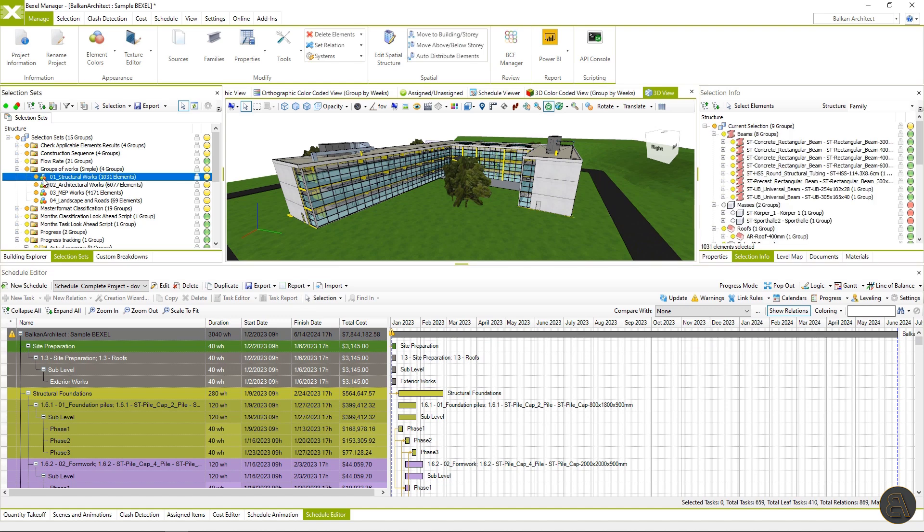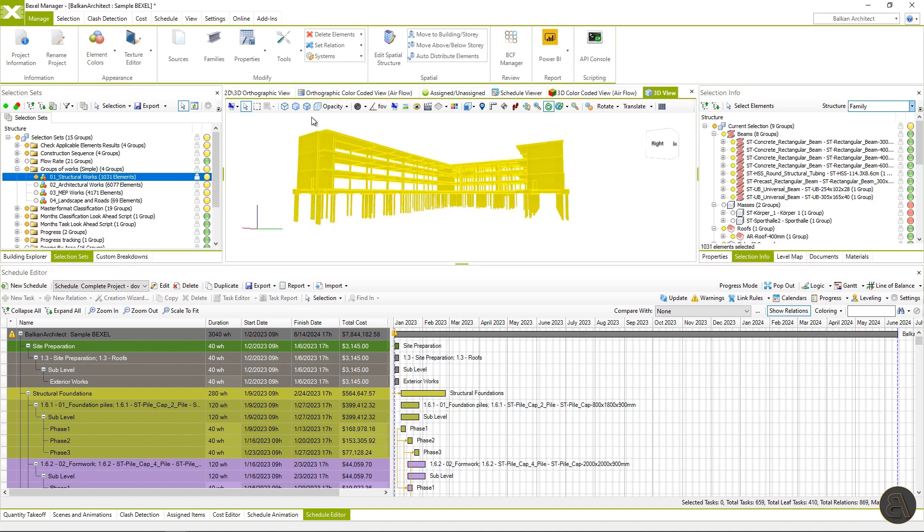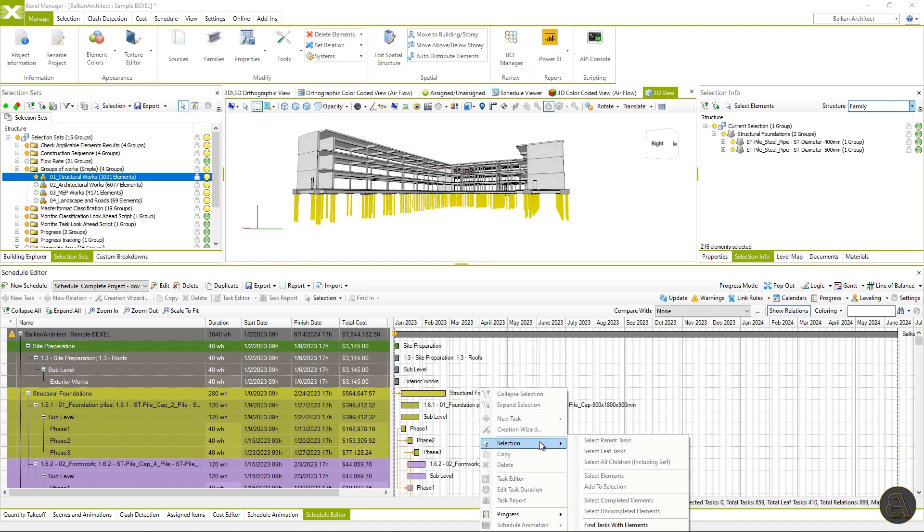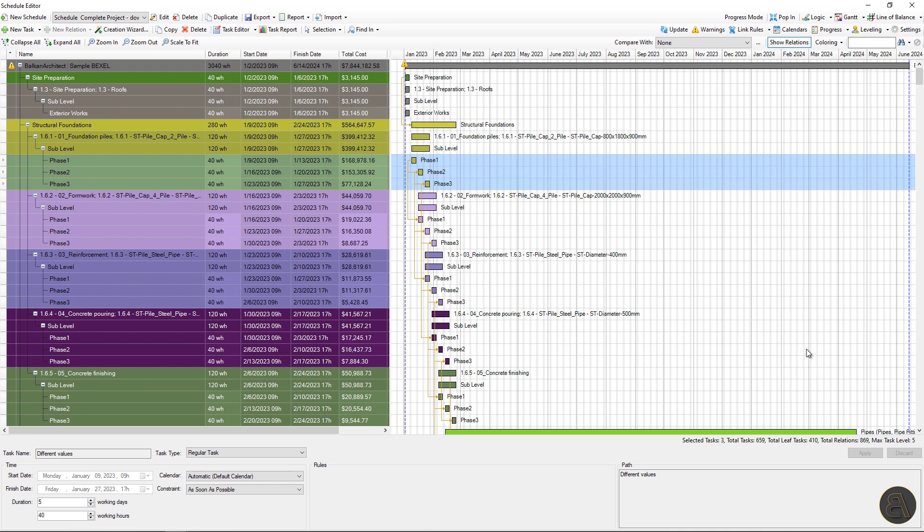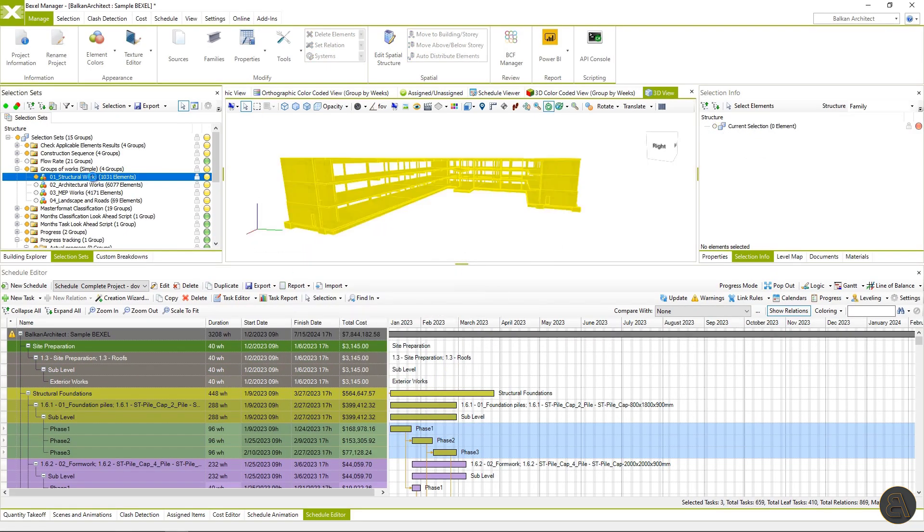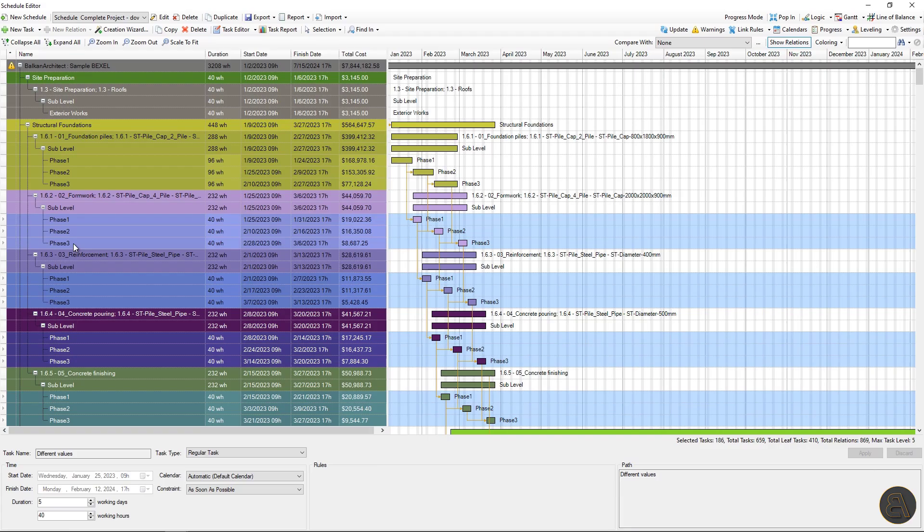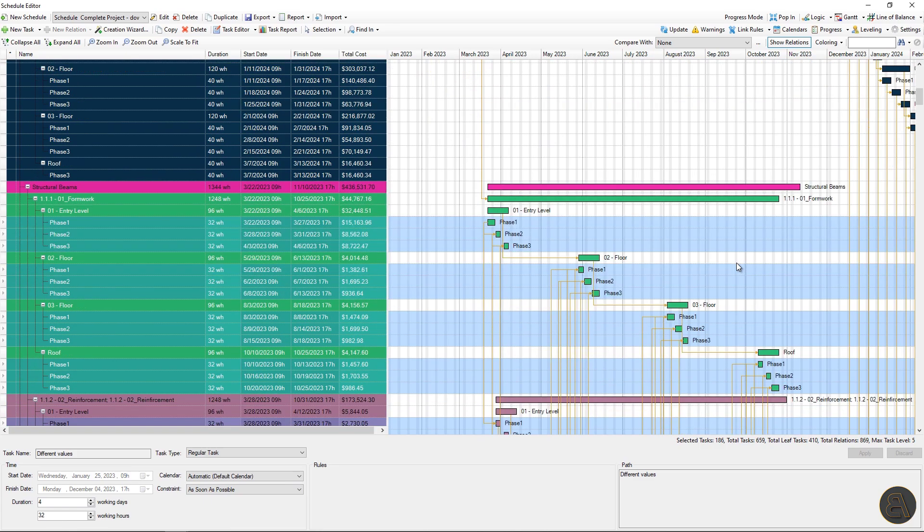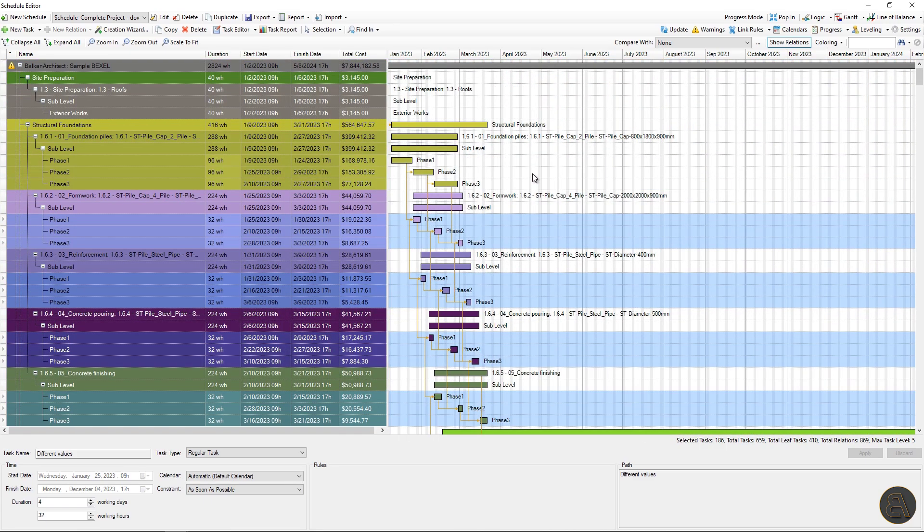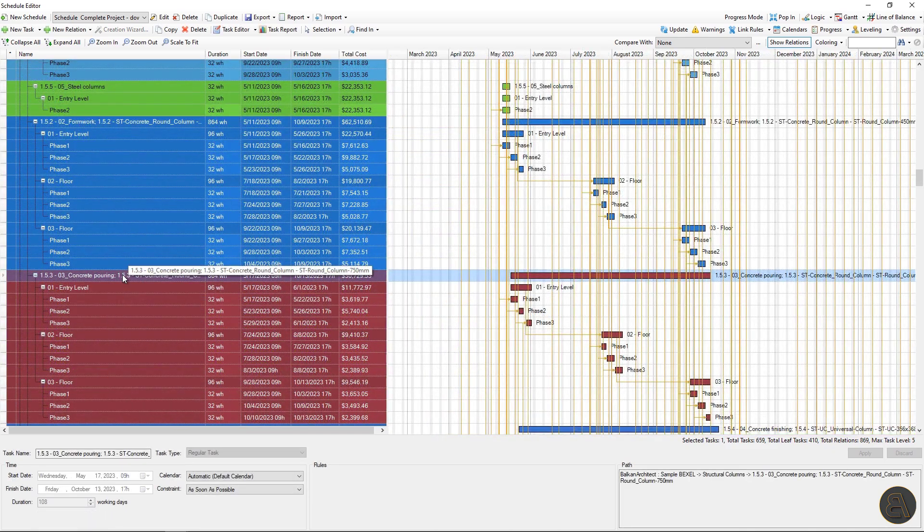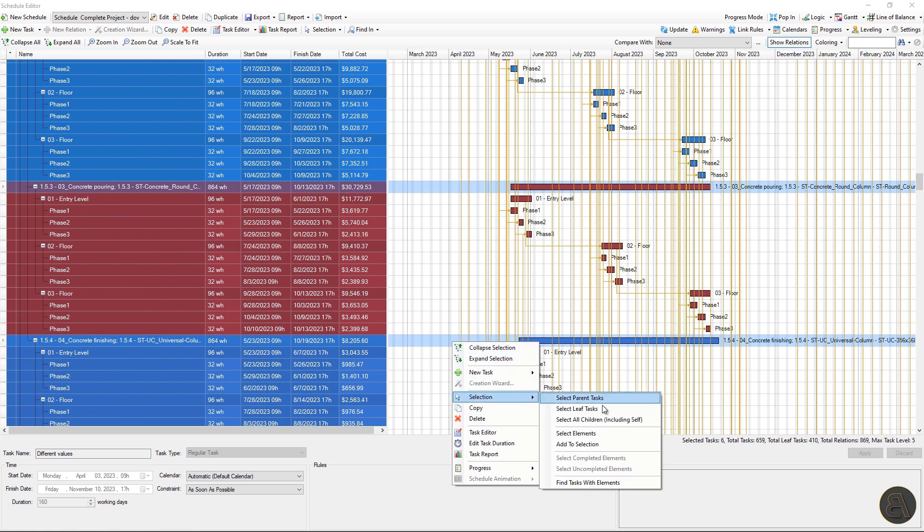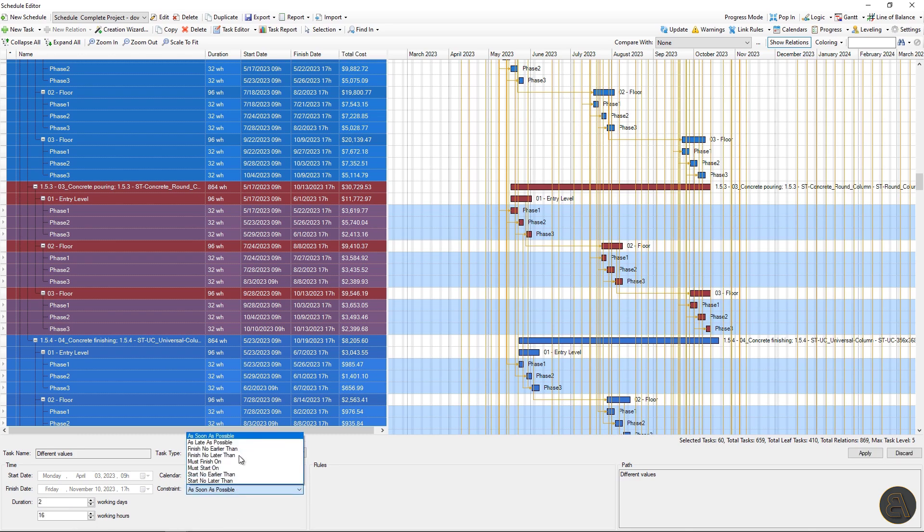First, I want, for example, to change the task duration for some activities in the schedule. I can easily select elements in the user interface and filter tasks with these elements, which will automatically select within the Gantt chart and just change the duration. Easy, right? In the same manner, we can select all structural works and reduce the duration of construction activities. For example, on 32 working hours. By clicking on the button apply, all changes are automatically reflected on task and schedule duration. Of course, you can directly select parent and leaf task within the Gantt chart or automatically select all dependent leaf tasks for selected parent task and fine tune them.